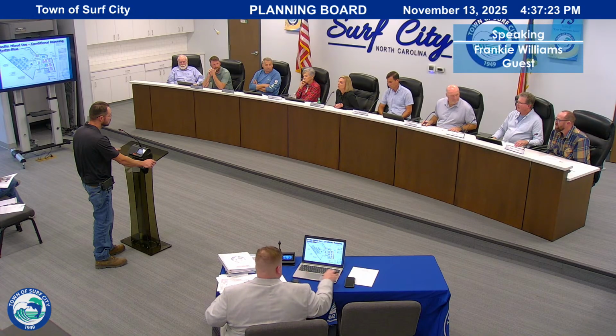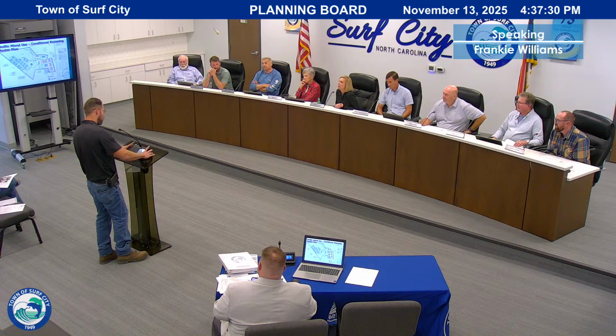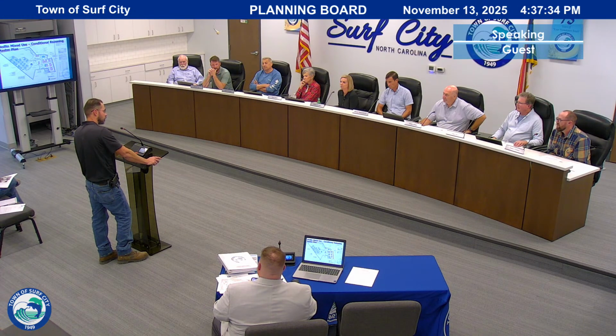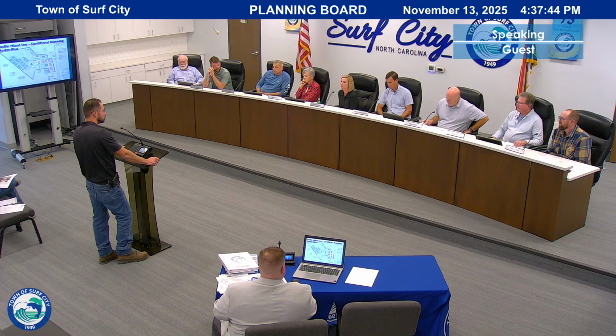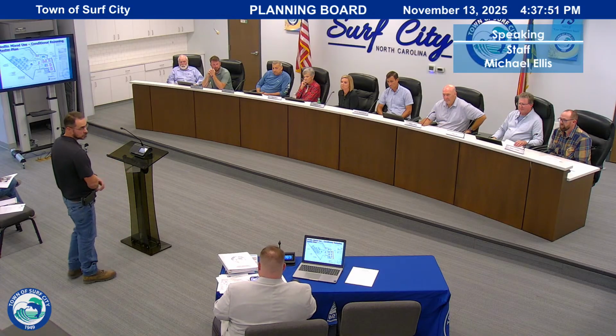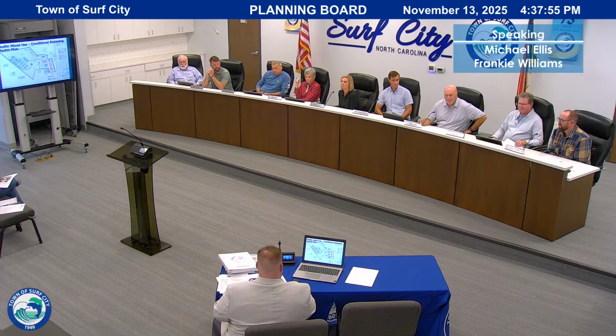Is there a way to make sure that the commercial is done first so it doesn't turn into just residential? Not under current policy, but the wastewater allocation policy is up for review and alteration in the December meeting, and it will be altered, I'm sure. But it can be ensured with designated phasing. Well, I would say the board could ask them if they're willing to make a condition on that. So it could be ensured like that. Would you be willing to do that?